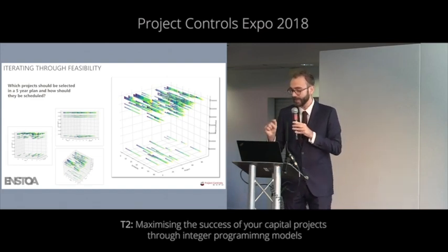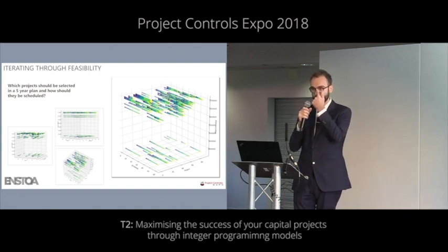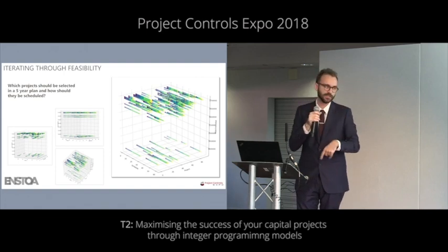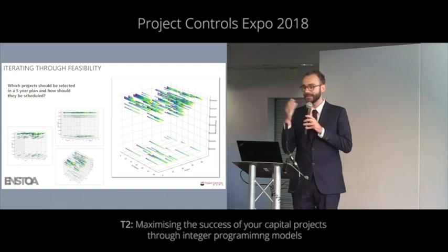Secondly, every distinct color in that 3D plot is a different phase. So within each project, you'll see that the phases run in exactly the same order in every instance. That's very important. We don't want construction occurring before design. And that is important because